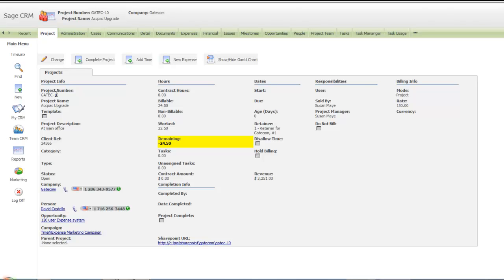Project templates look and act just like a project, but they can be copied at will to create new projects without copying details that you would expect are different for each new project, such as the contract information. For example, the most important details about the project are the tasks, the resources, the billing method and rates, estimated times, and more. Once you have templates, you're ready to get to work by creating your first project, either using a template or creating a project from scratch.